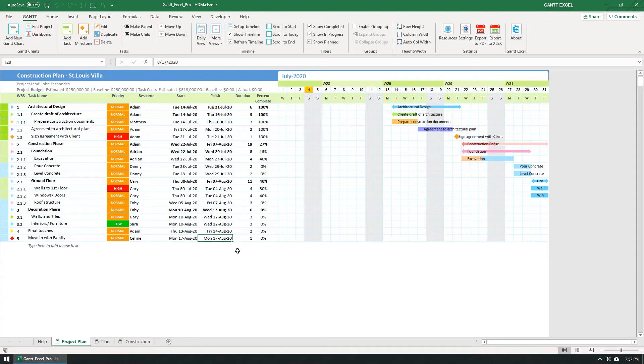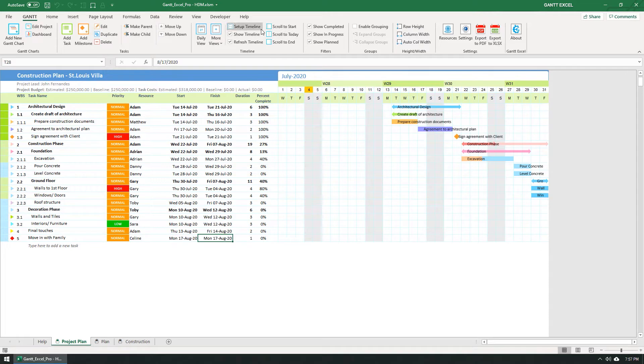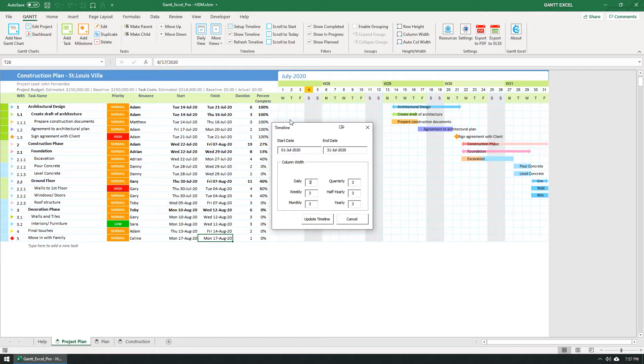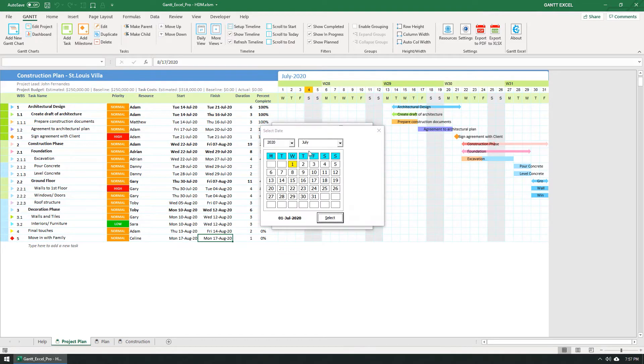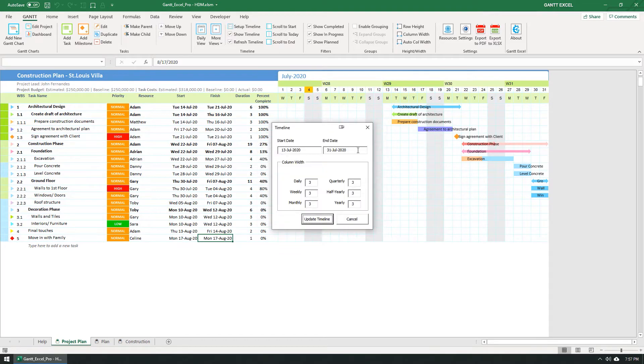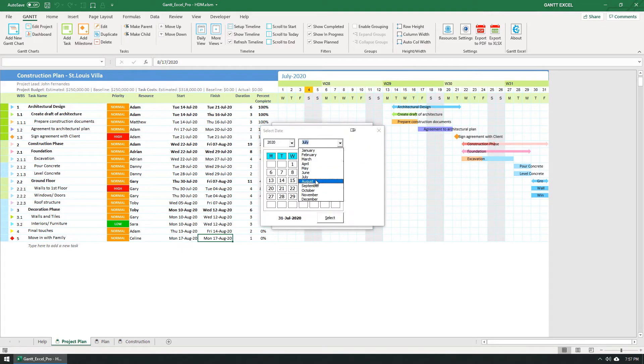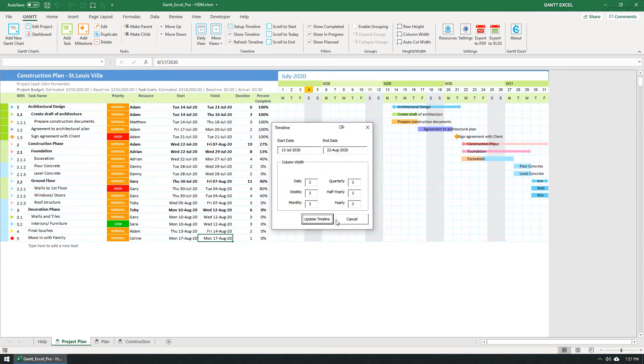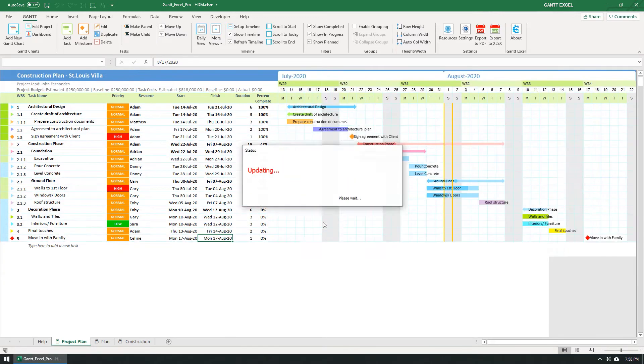So let's go ahead and set up the timeline correctly so that all the Gantt bars reflect within the timeline. Click the Setup Timeline button in the Gantt menu. The Setup Timeline form opens up. I'm going to change the start date to 13th July and the end date to 22nd August. Click the Update Timeline button when done.